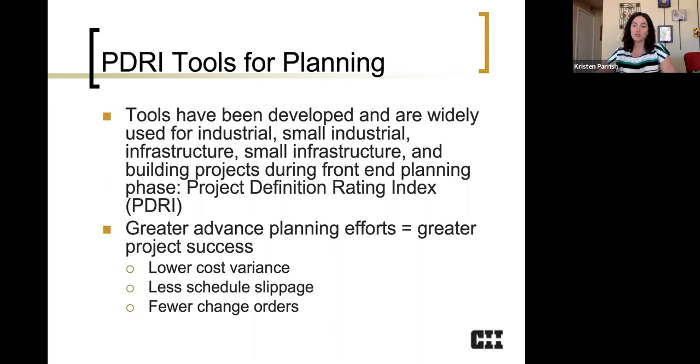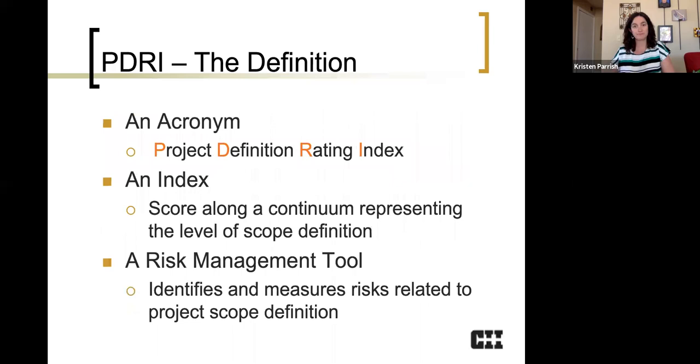And what we found over about 30 years of research at CII is that the more effort you spend in planning, generally as a percentage of budget, the better off you're going to be in terms of your project performance. And that's both in terms of cost and schedule. So cost is both via cost growth and lower cost variance, as well as a reduced number of change orders. And then for schedule, of course, we're looking at slip.